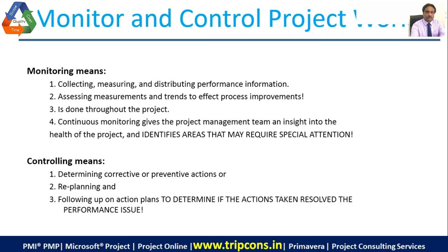Okay, and you would look at any kind of impact on the time, cost, quality, human resource, procurement. If that is there, you take care of that. And you would follow up on the actions to find out if you changed something, did it have a beneficial effect on the project or not? Beneficial effect means, has the project come back within the planned values or not? Am I still going to finish it on time as per this task plan? I'm going to finish it within the budget of this task. Am I going to finish it within the work effort of this task? That would be the result of good controlling, right?